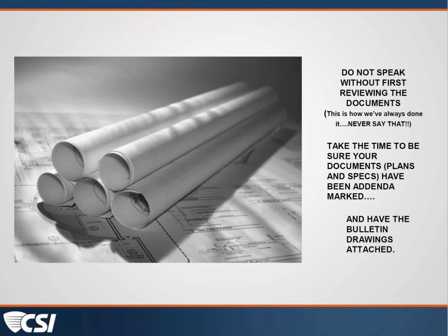Oh yeah, we both have mostly that experience where there is a requirement for a set of record documents or as-built drawings. Then that's a whole conversation between what do you call it, record drawings or as-built drawings, and different camps in that regard. But yes, it would be a record set of documents that was produced at the end of the project that would involve the inclusion of the addenda and any other subsequent issued information. I don't know if I said that right, Doug, but... Yeah, I think that addressed the record drawing or as-built drawing piece of it.